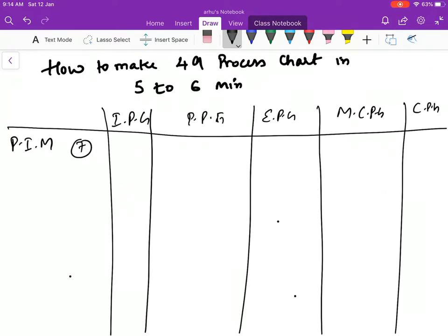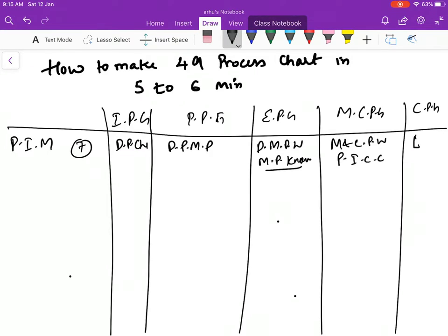It starts off with develop project charter in the initiating process group, followed by develop project management plan, and then you've got direct and manage project work, followed by manage project knowledge. This is the new one. And then you've got monitor and control project work, and then perform integrated change control. Finally in the closing group, close project or phase. Okay, that's your first one.